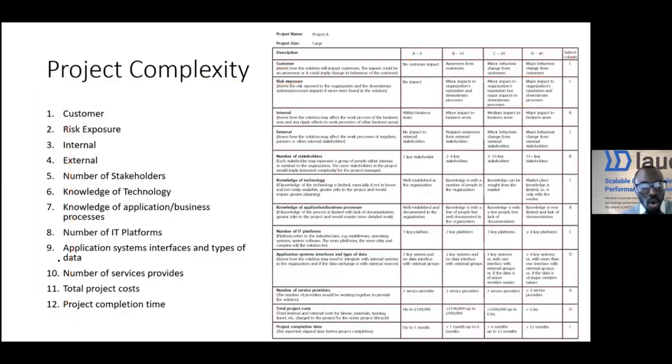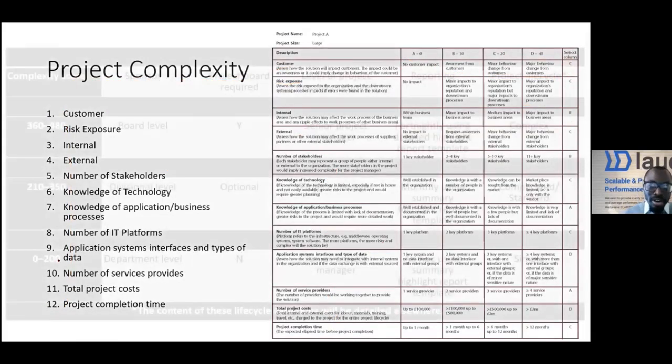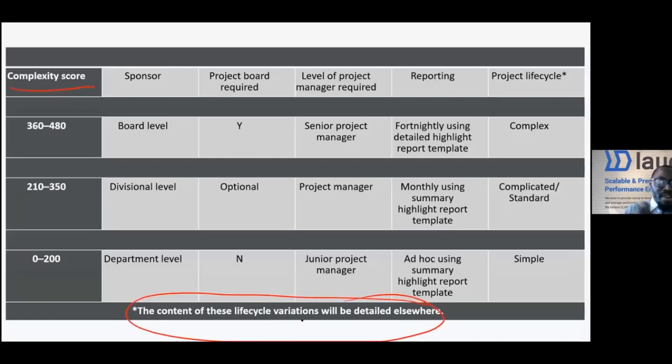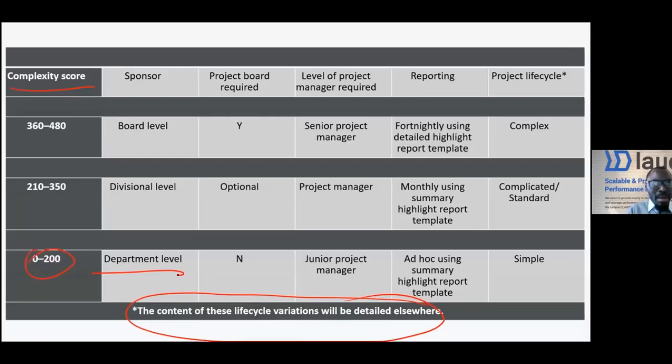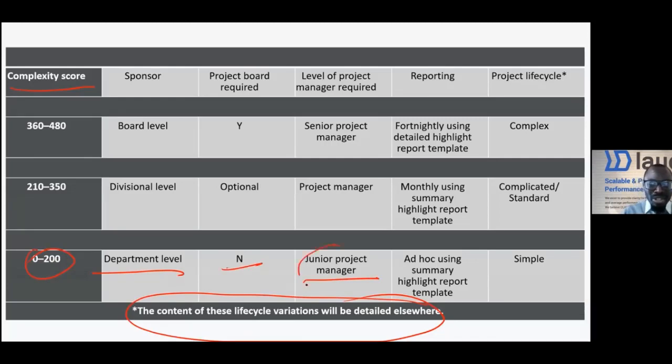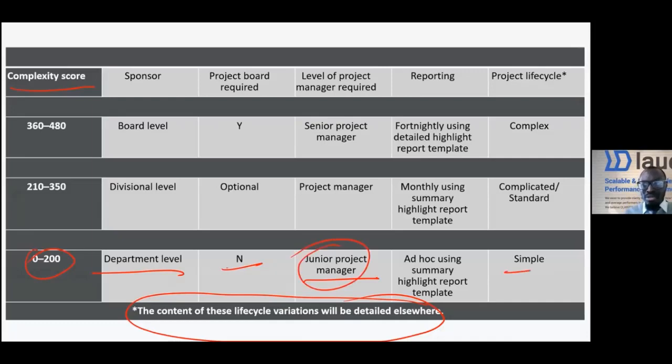Many organizations had to their framework to say if a project scores between zero and 200, it's not that complex. It can be managed at departmental level, and we do not even need a project steering committee for that. When it comes to who should manage it as a project manager, we just need a junior project manager because it's not a big deal. It's a simple project.